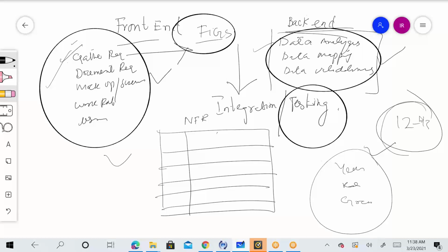So I shared the non-functional requirements with the development team before even writing down this document, because they are not the ones who are going to decide on non-functional requirements. For example, one of the non-functional requirements is updates. When this application is going to get new updates, they don't know. They need to talk to the RTB team, run the bank team, or in other words the production team. And they need to find out when we are going to implement our solution, when you guys can update our application, when you guys can maintain our application, and what the disaster recovery criteria for our application are.